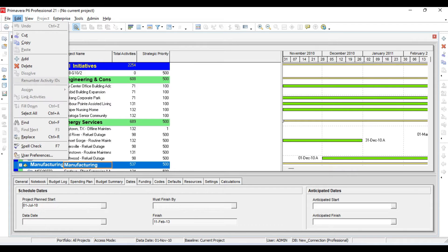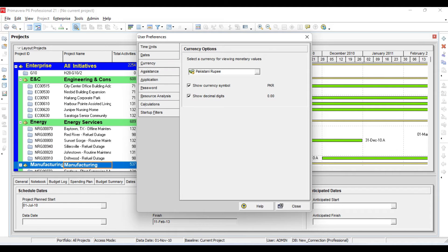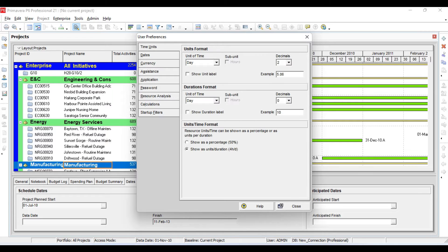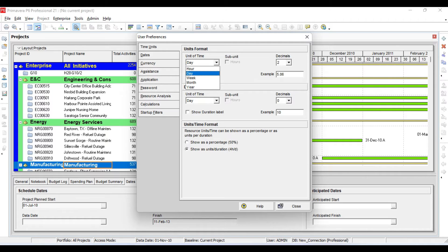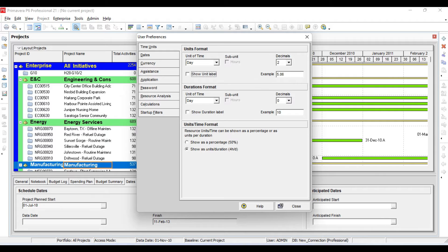First we will go to User Preferences. Under Time Units: if your company is paying in hours you should set it to hours, and if your company is paying in days you should set it to days. My company is paying in days so I will make it days. For decimal points, I recommend two, or you can make it zero. I will uncheck the levels box here.